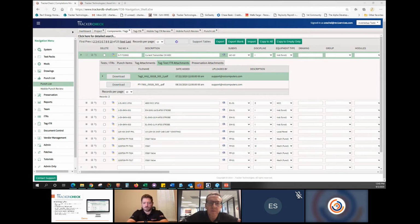So say we're going to go over our normal turnover date by 3 days because construction was late turning it over to us. We can adjust our projected turnover date and then push that back into Primavera. So we don't have to wait for the Friday schedule review and then everybody updating it on their spreadsheet.